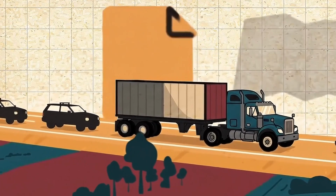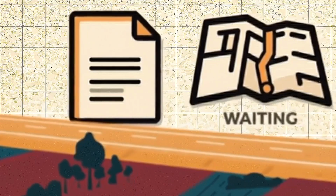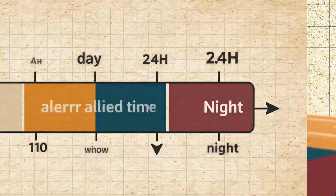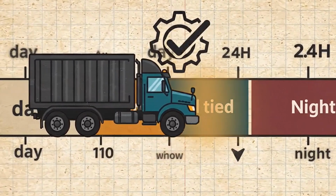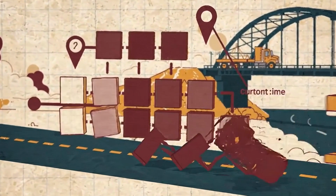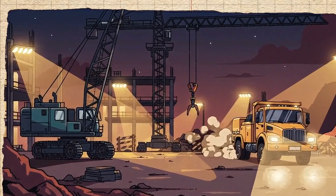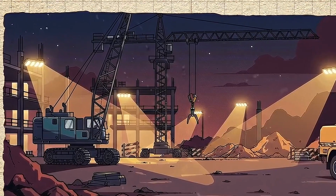It says a crawler crane alternative would have required almost complete disassembly, roughly 20 truckloads, and closer to 2 days to relocate. That comparison comes from the company that supplied the all-terrain crane, so it should be treated as a contractor claim rather than an independent engineering verdict. But commercially, the logic is powerful. Suppose a cheaper machine adds a day to the critical path. The customer may not care that the equipment line on the invoice is lower if the project loses access to a road closure, a crew, a delivery window, or the next trade waiting behind the lift.